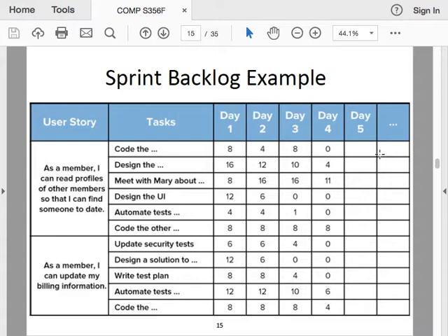So if you plan your project to finish on time without the need to work overtime, then if something goes wrong, you can still work a few extra hours to catch up, right? So that's some idea. If you have 4 persons working on this, then each person works 8 hours. So 4 times 8 is 32. Then this 33 hours worth of work, we still have a good chance to finish it after day 5.